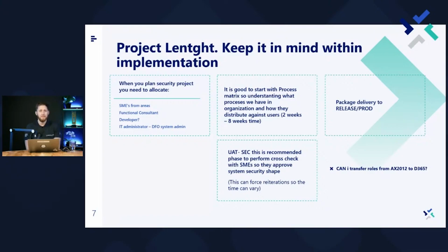And IT admin, of course, the DFO system administrator, the person who will allocate the roles, who will make those necessary imports of the system, importing of roles, which will give you the possibility to perform UATs. And mentioning UATs, UAT for security access is a critical component. User acceptance tests means for security that your role which is created is validated and signed off.